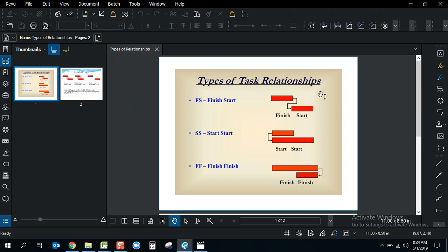And you'll see it here in the Gantt chart. This task finishes, the next can begin. The next type of relationship, and probably the second most common utilized, is a start to start. When one activity starts, so can another. For instance, when rough framing begins, you can start overhead MEP at the same time. Or when you finish paint, you can start doors, frames, and hardware and millwork at the same time. So that's a start-to-start relationship.